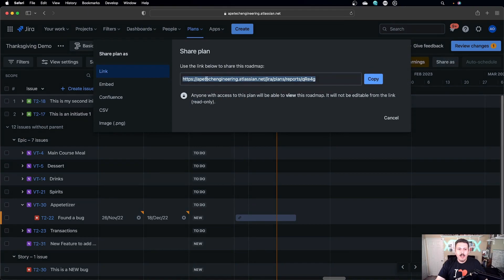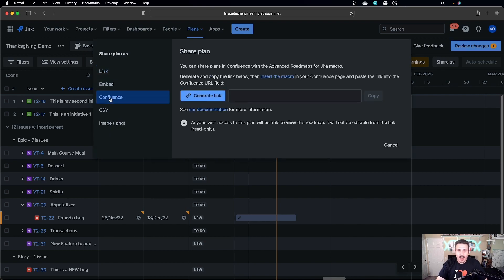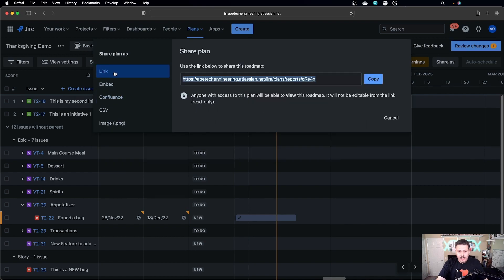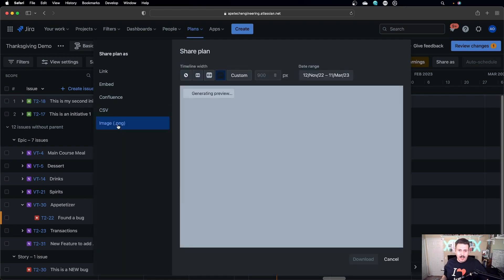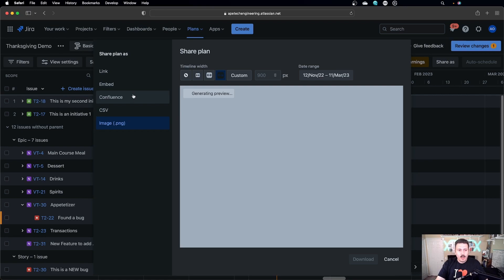You will see a button on the right-hand side that says 'Share as.' If you click on that button, you will have a couple of options. You can just take the link, which is okay, but you will see a specific Confluence link over here. Not only do you have the link and Confluence, but you can also embed using an iframe. You also have a CSV option, so you can export your entire plan to CSV. And finally, if you have non-paying stakeholders who would like to see your advanced roadmap, you can export it as an image as well. But for the focus of this video, we're going to be sticking to Confluence.